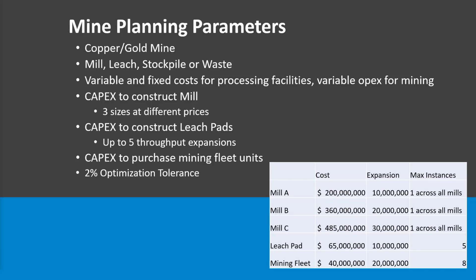I'm looking at a brand new mine, going along with this constrained capital theme. Because of that, I'm loading this model with a lot of what we call CAPEX — capital expenditures. I don't currently have a mill, so the scheduler is going to have to pick from three different mills at three different throughputs, each with a different capital cost upfront paid in year one. The mill then becomes active in year two, and I've told Scheduler to please only pick one of those for me.